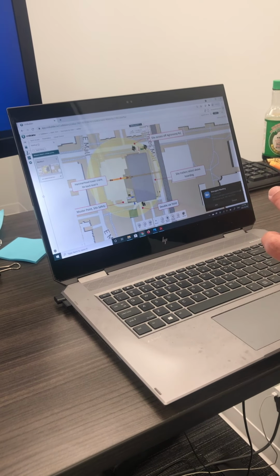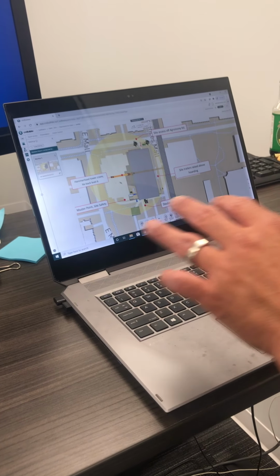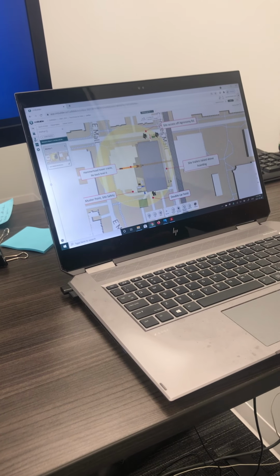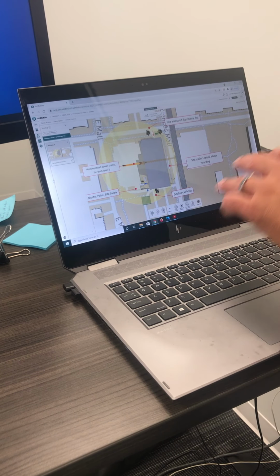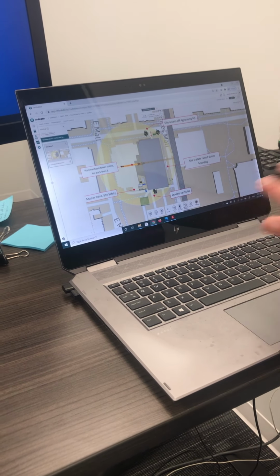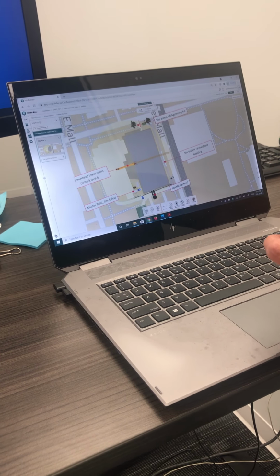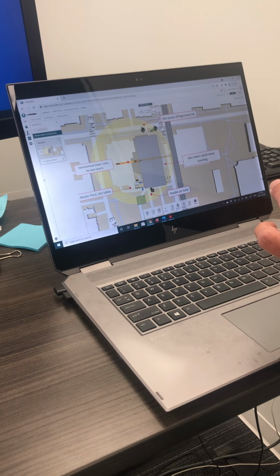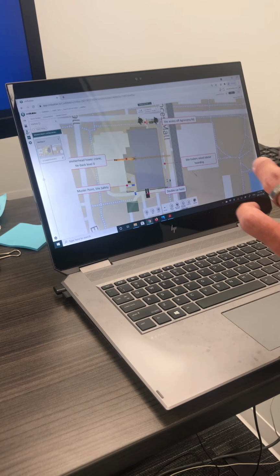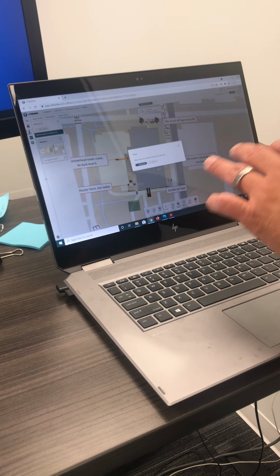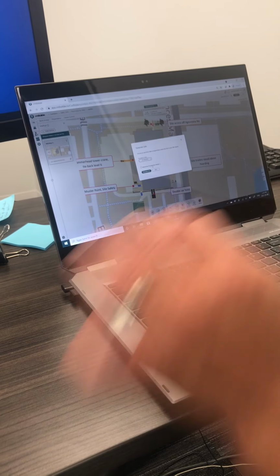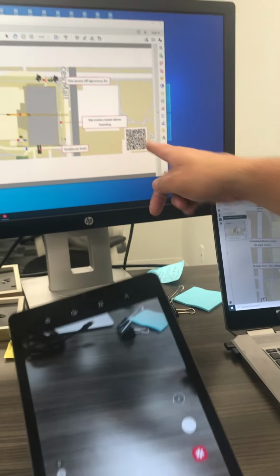For example, muster point, hammerhead crane location, double car hoist, single trailers raised above the hoarding, site access off what road. So I've created a markup that can be viewed both in 2D or in 3D. And then in that 2D mode I created a QR code directly from the generate link portion and included it onto the drawing.